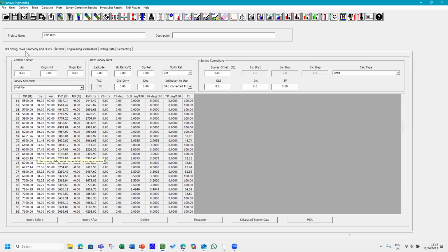And that something will be going back to your ERD well and changing the shape slightly to improve it on that part, or improvement in the BHA, improvement in the mud system. There are different ways to do it. Whichever is the easiest one, you think? The easiest one is to do engineering. Don't change the trajectory as a first pass.